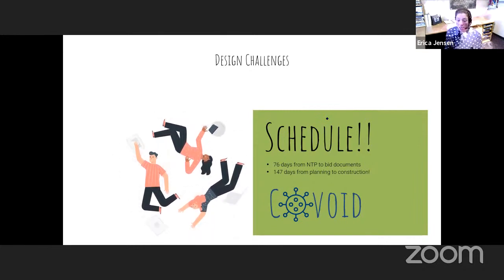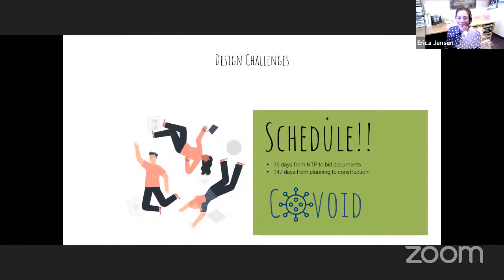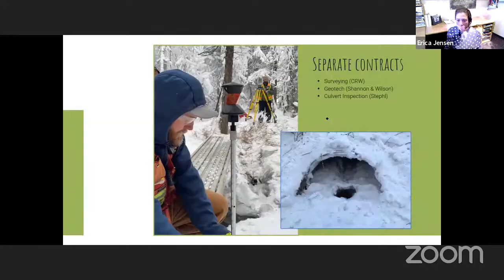From beginning to end of the project, it was 147 days. So you throw COVID into all this and the schedule was definitely a challenge. There were only 7 days in the week and I was working all of them with the whole team. The whole team was working 7 days a week. So luckily there's a short amount of time we were doing that, but schedule was a big challenge.